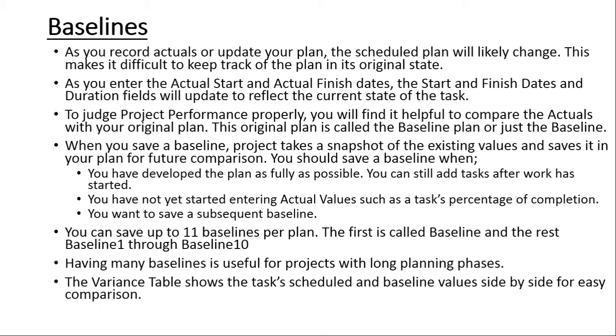Because if you are going to be comparing activities and resources, then it means the baseline with which you are comparing should have all the tasks and all the activities that you are going to be recording during the course of the project. And you also need to save this baseline before you start entering the actual values, because the moment you enter an actual value which is different from the plan, it already alters the plan.